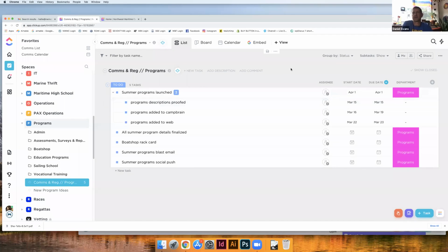I'd say, Hallie, that's a good use of dependencies too. If everyone has to read something and they're all dependent subtasks, it doesn't officially check the task until all the dependencies are complete. Yeah, that's a great idea.